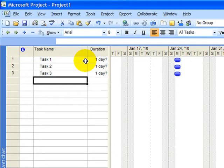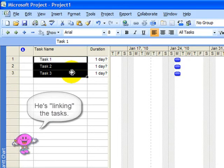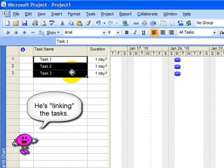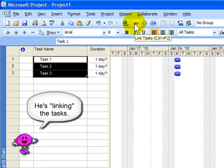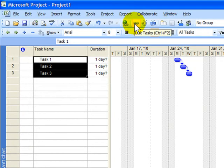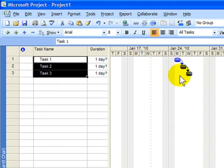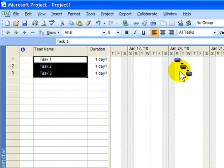Maybe there are relationships between these tasks. And again, as you will learn later in the planning process group of our course, you can highlight them and click a linking button on the toolbar to link them together. This indicates that the first task must finish before the second task can start, and you can see that indicated with those arrows on the Gantt chart.